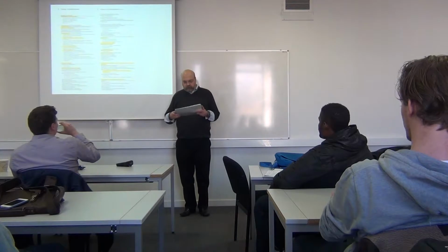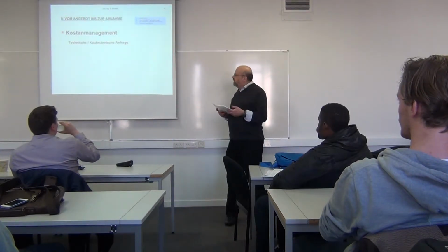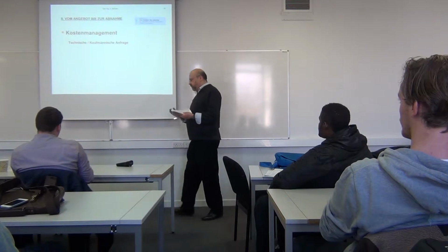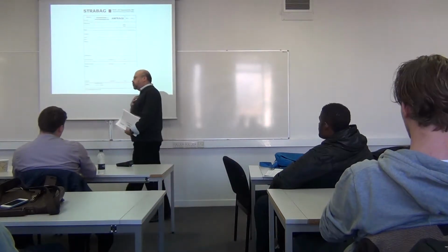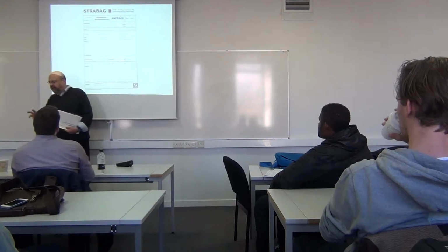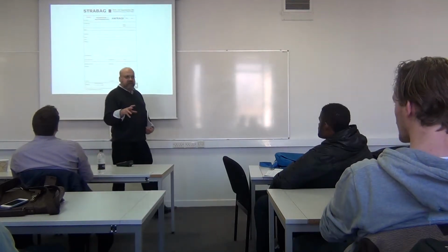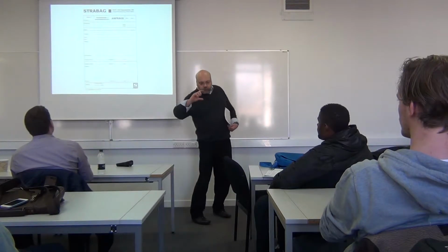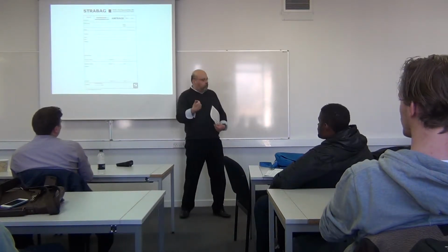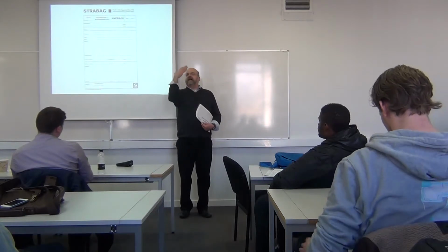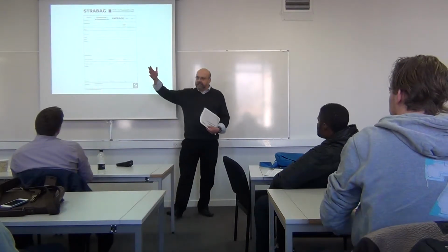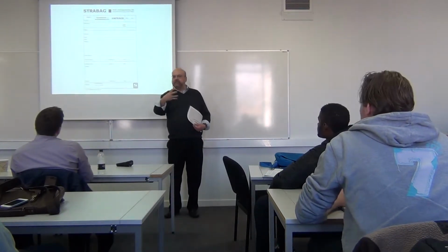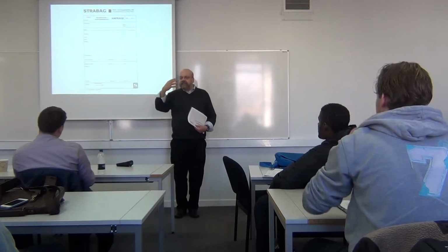Yeah. Good. Next, please. Then we did the following. You can show the next also. Yeah. In the phase of the bidding, if we are unsure about some things in the plans, in the descriptions, in the specifications, we ask. Let us ask the client or the client's people, like the architect, engineers, and so on, who are in charge of it from the client's side. Let's ask it and document it.